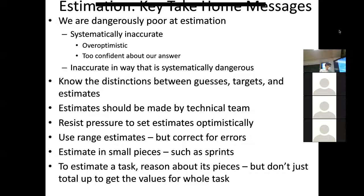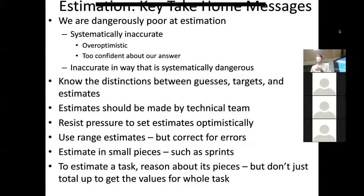Range estimates also give the sense of worst case and best case, which can be very helpful for informing a manager's sense of risk. Another principle that agile approaches really emphasize is that it's much better to estimate a small sprint — maybe two weeks at a time, not three months. And to estimate in an informed, scientific way: break it down in your head, enumerate the pieces, think about how long each would take, what could go wrong, contingency issues like vacations or team absences.